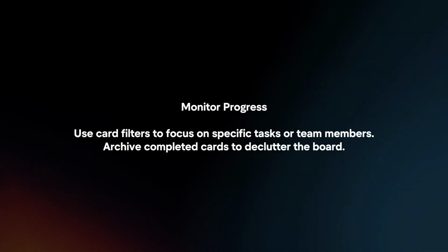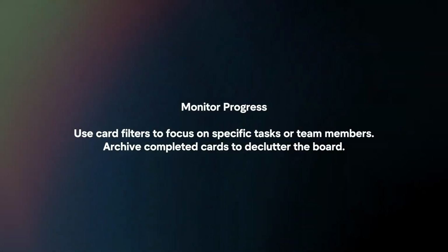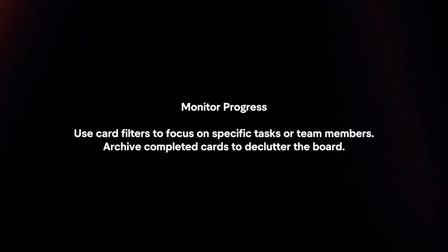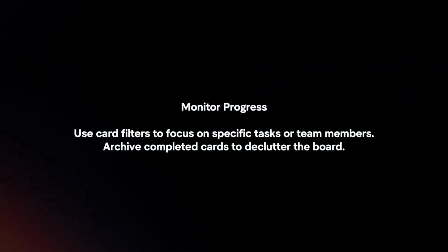Monitor progress. Use card filters to focus on specific tasks or team members. Archive completed cards to declutter the board.